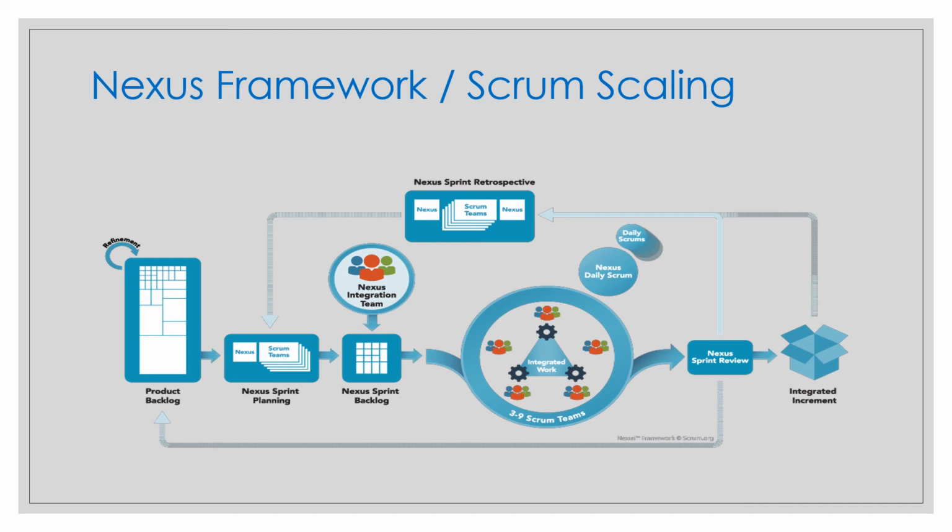So a feature team will work through all the layers of the feature, and the developer has the knowledge to fulfill the customer need: your front end layer, your back end layer, your business logic layer. So a feature team is cross-functional and cross-component, because it has all the skills needed to complete the feature, and does that by working through all the layers of the components of the application.